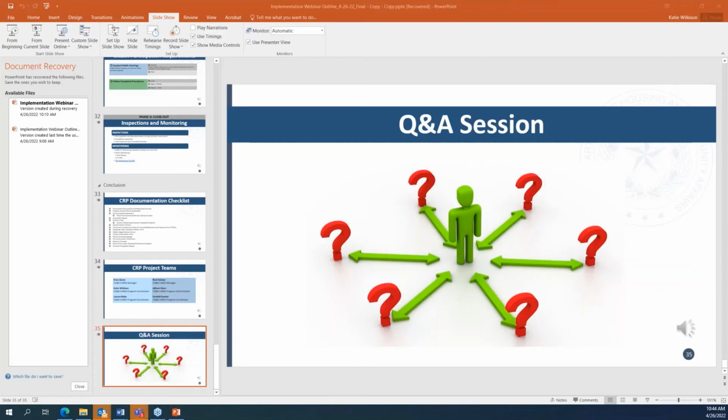So a lot of the renderings, the drawings that y'all have submitted, we've already forwarded those to ADA within TDHCA for review. I think there's a couple that we are in the process of reaching out to. So the ADA compliance review should happen before construction. And a lot of y'all are in that process right now of it being reviewed internally here.